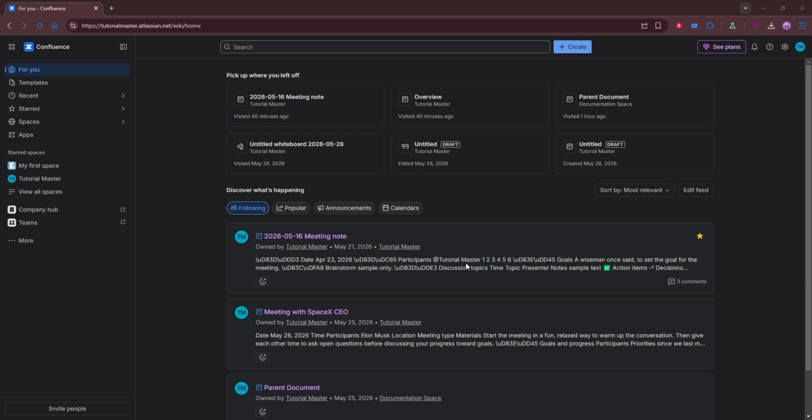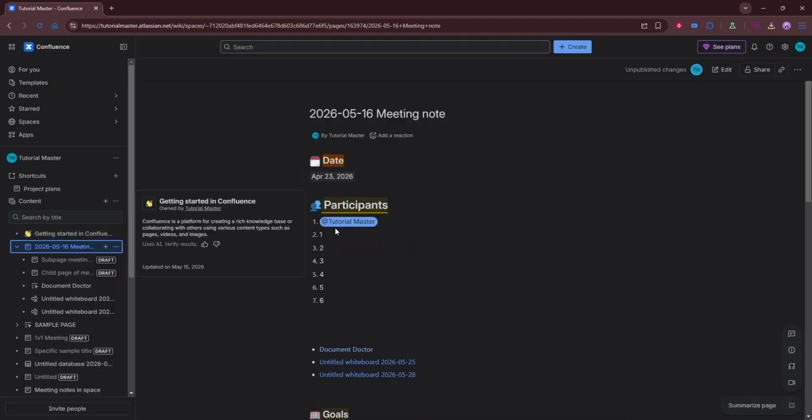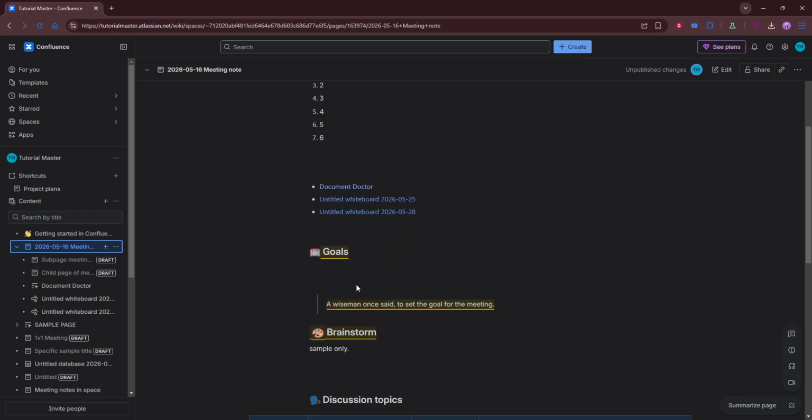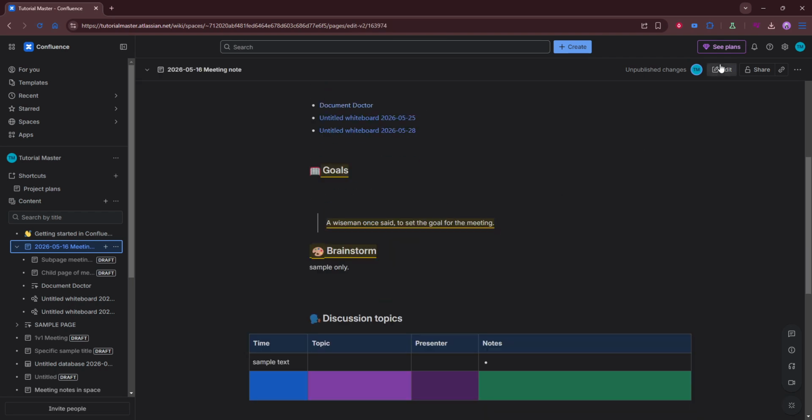Open the plan and confirm the timeline, filters, and groupings are set the way you want your audience to see them. If you use saved views, switch to the one that best represents the story you want to tell. Double check that the fields you need, like target dates, team, or status, are visible and that any sensitive projects or issues are filtered out.